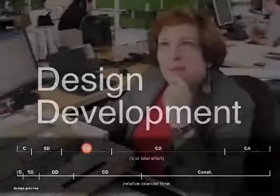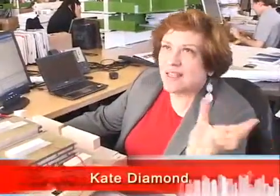So Brent has described how we get through concept design, schematic design. Now imagine that the client has reviewed that schematic design package. You've done a conceptual or schematic level cost estimate and verified that you can in fact afford to design the project the way you've designed it. Now you want to know in greater detail what the real decisions are about materiality, color, finishes, all of the elements of the building systems. That's the phase we call design development.